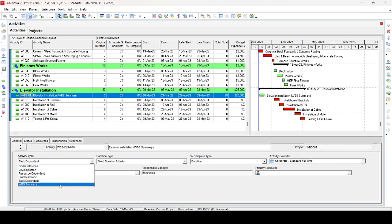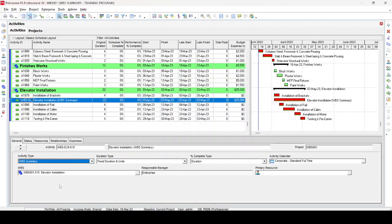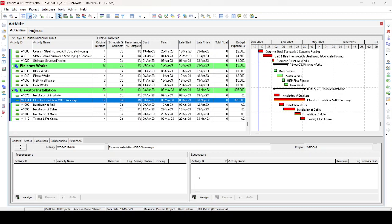We forgot to make this WBS Summary, I think. We're going to select WBS again and run F9 again. Now you can see this elevator installation is same as this Summary level at the top, start and finish, and it's spanning from the start to the finish of this WBS. If you go into relationship, you will find that no relationships are assigned. So this WBS Summary activity is some sort of level of effort, but in the level of effort we assign a project start-to-start and project finish-to-finish commitments. But this WBS Summary activity doesn't have any relationship. It takes the start of the WBS and takes the finish of this WBS and spans over the duration of this WBS.